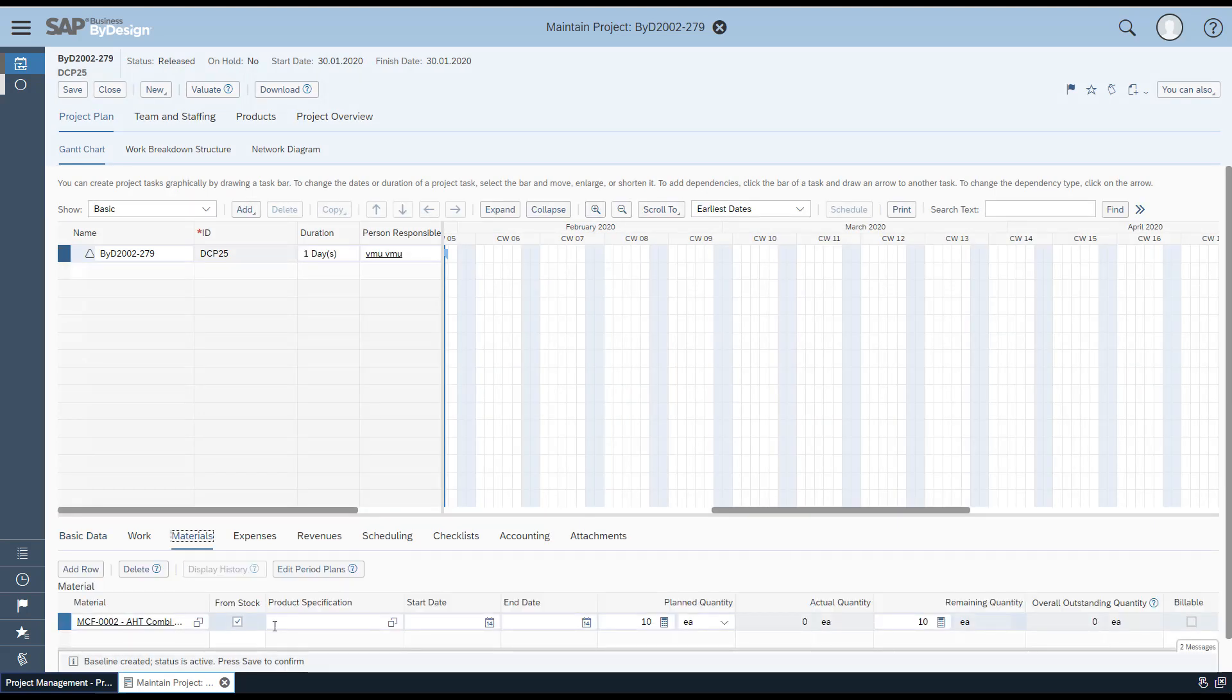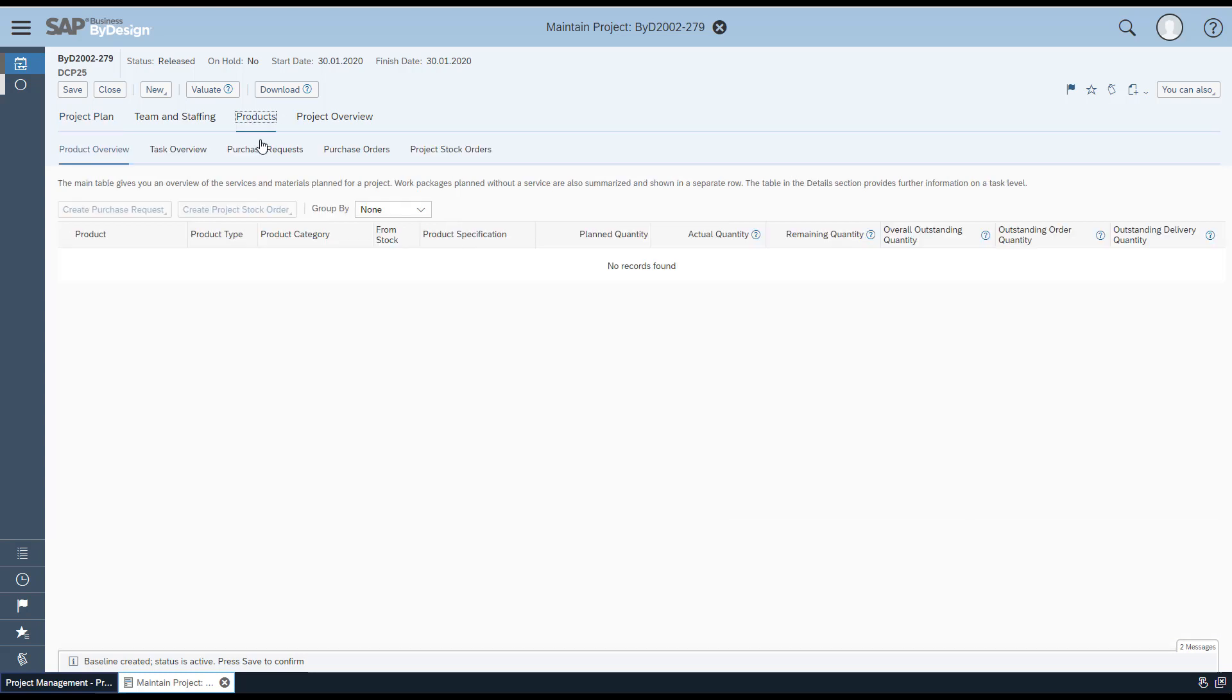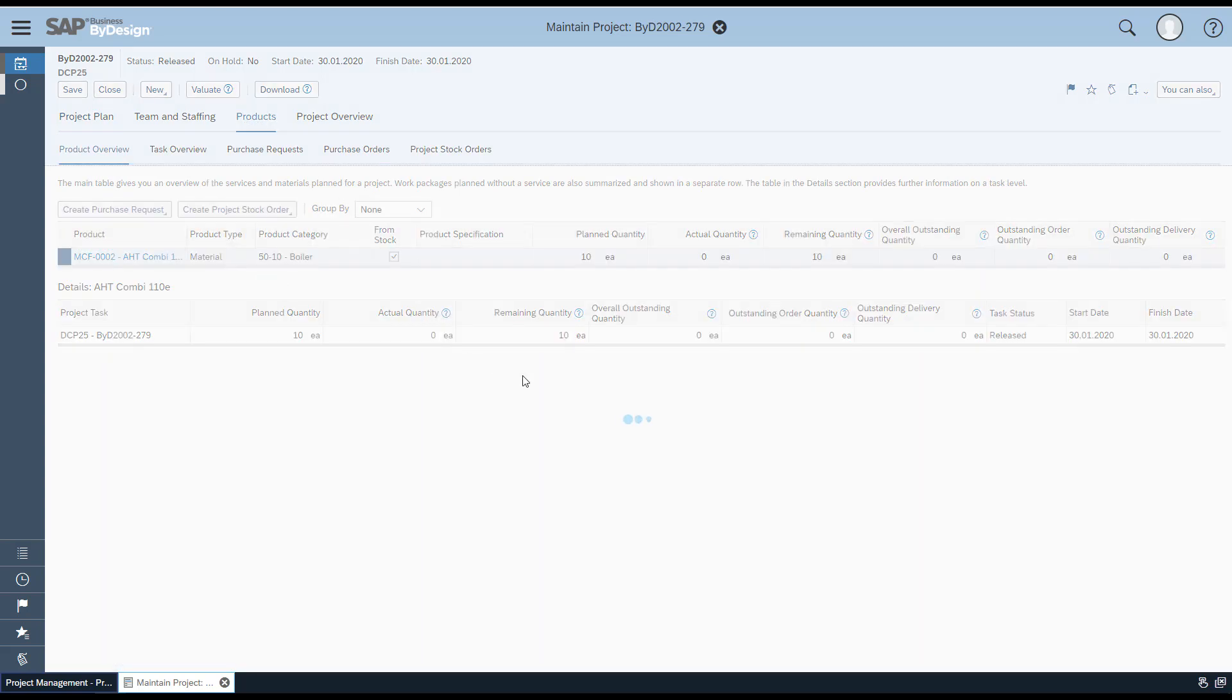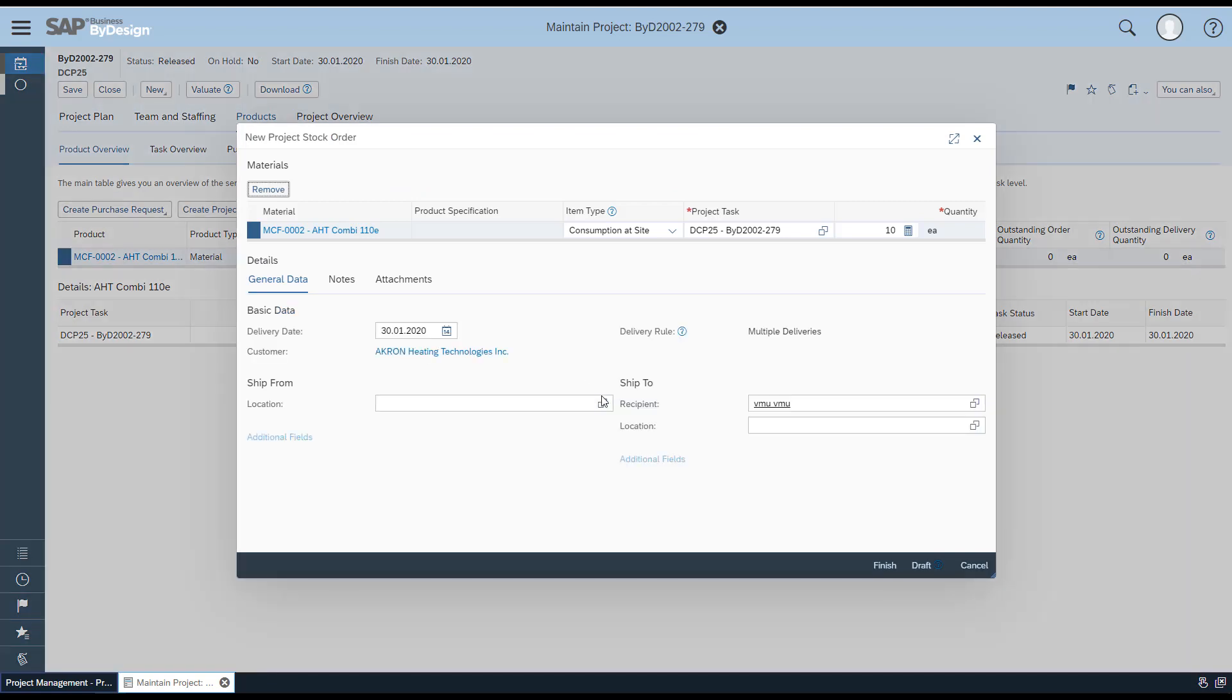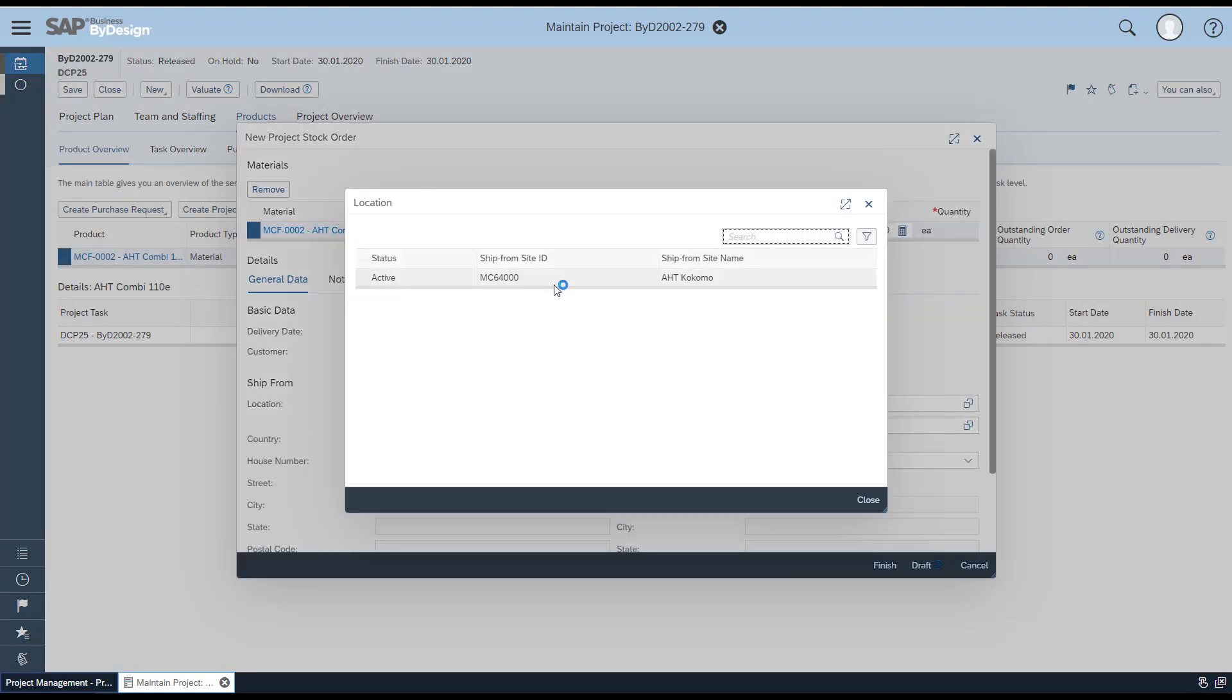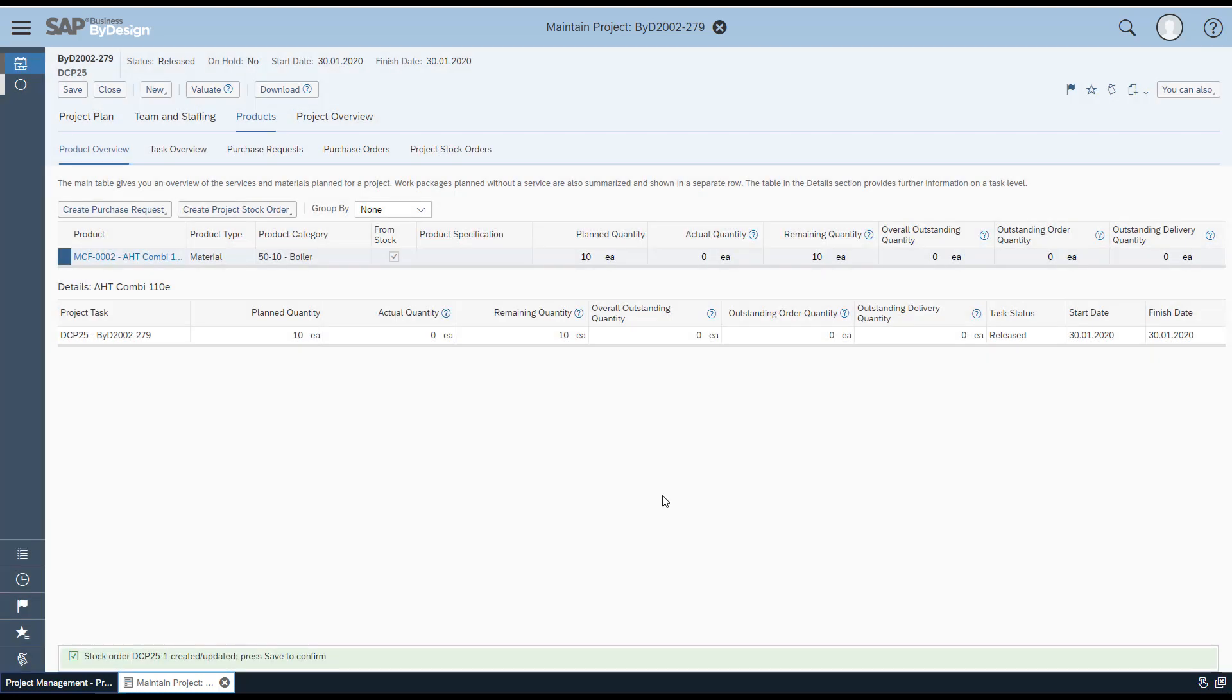Go to Materials, make sure 'From Stock' is checked and plan quantities entered as desired. Navigate to the Products tab, select the product, choose 'Create Project Stock Order' option, select the relevant ship-from location, check all details like quantity, and click Finish. The project stock order is now created from the relevant project.